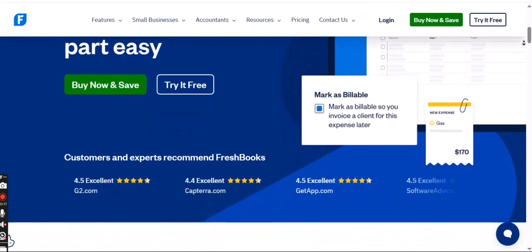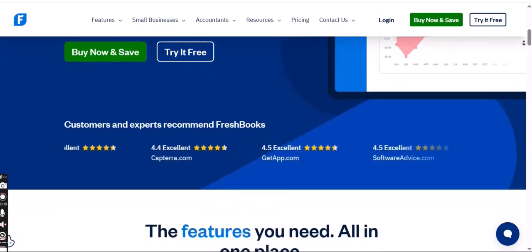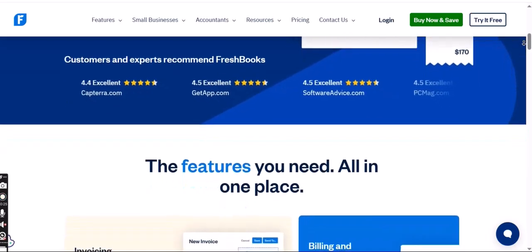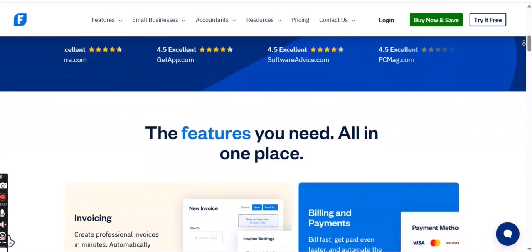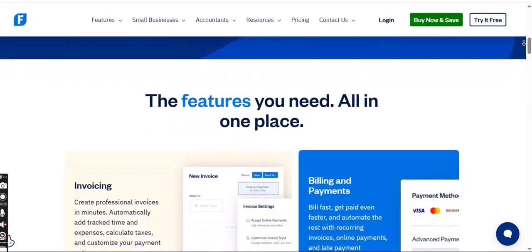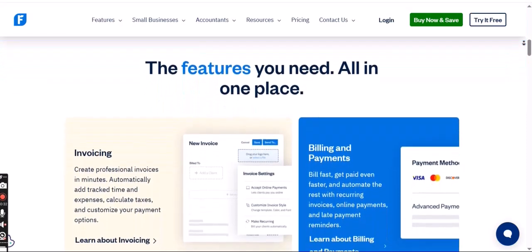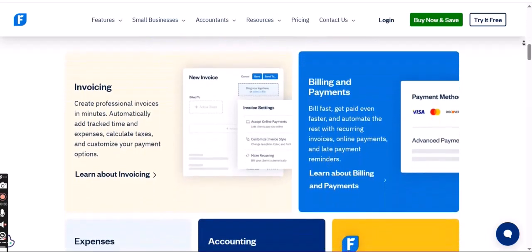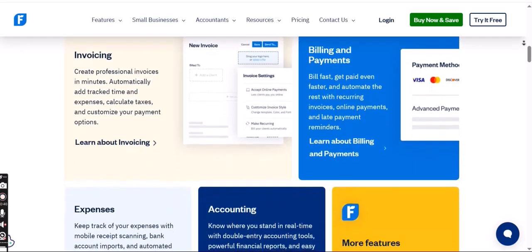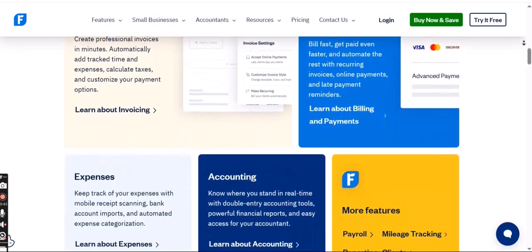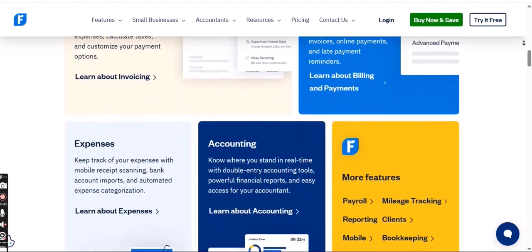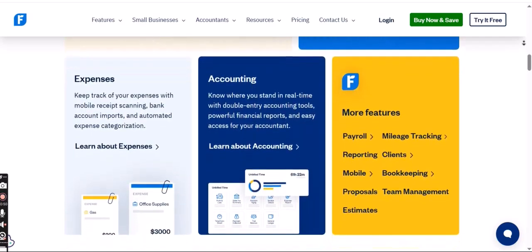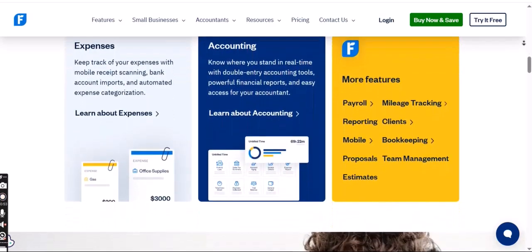Project managers, optional: assign a project manager if needed. Set project rates, if hourly. If you selected hourly billable as your billing method, you'll then specify the hourly rate for this project. You can choose project rate, a single hourly rate for all time tracked on this project. Team member rates, different hourly rates for individual team members working on the project. Service rates, if you've set up different services with unique rates, e.g., graphic design at $75 per hour, copywriting at $60 per hour. You can apply those here.